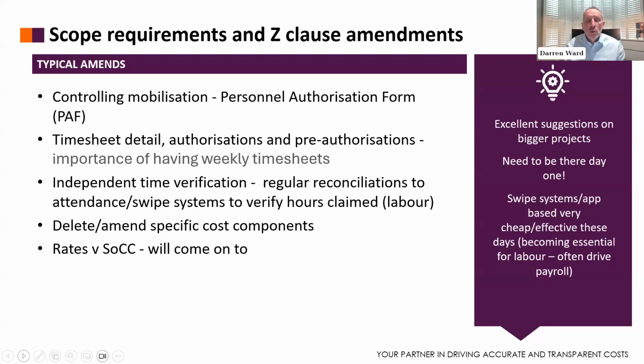So each new worker coming to site has to have a mobilization signed off prior to charging commencing. We see timesheet detail enhanced. We see extra authorizations required on weekly and monthly sign off on time. And we also see pre-authorizations quite commonly for things like overtime.